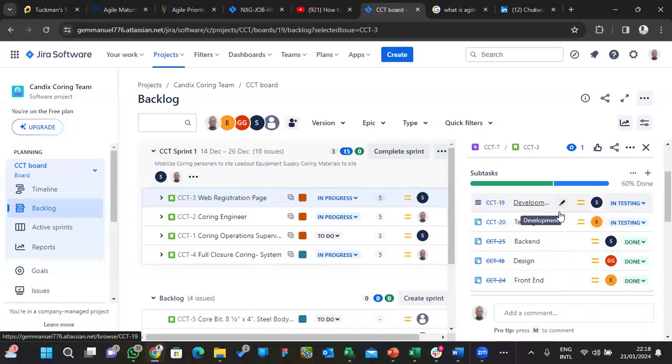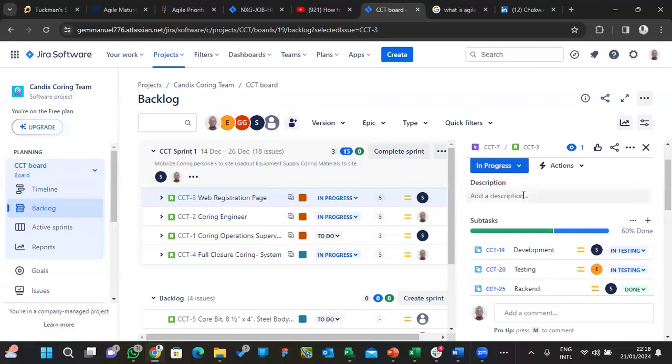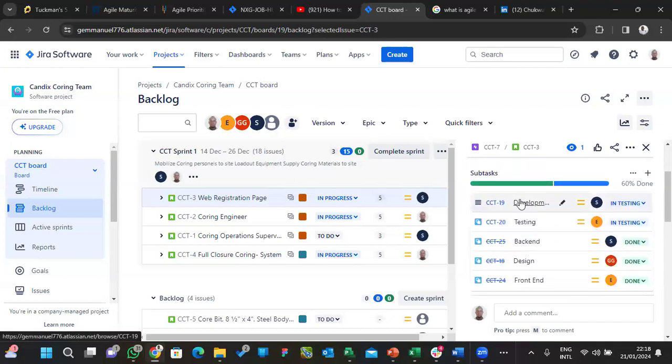So these are the guys now. This is where you must talk about time, right? Because you're going to use it to check their workload. Don't worry, when we get to capacity plan, this will get clearer, because you don't use story points there. Of course, there are two ways to do capacity plan: either use story points or timing. We are going to use timing because they use it to calculate their workload, right? Each individual will ensure that they don't exceed their effort in a particular sprint, so you don't overuse them. This is where you do that, right?